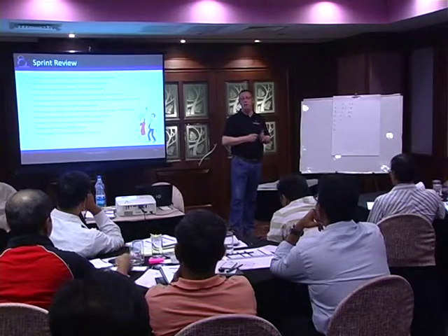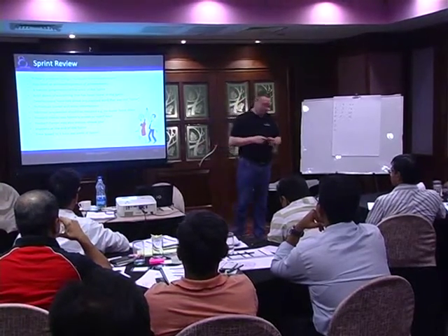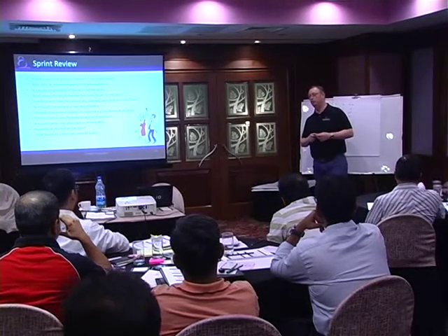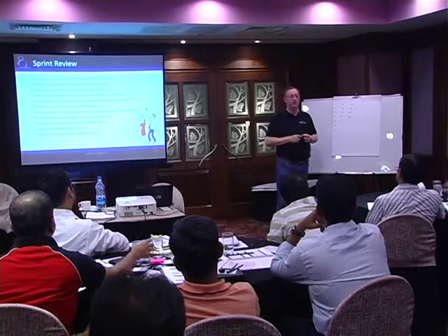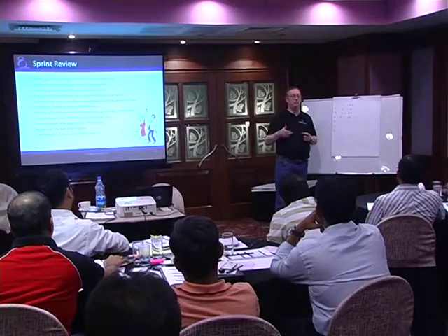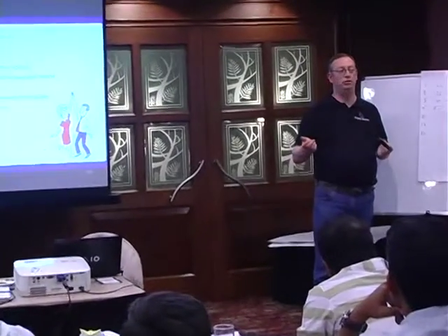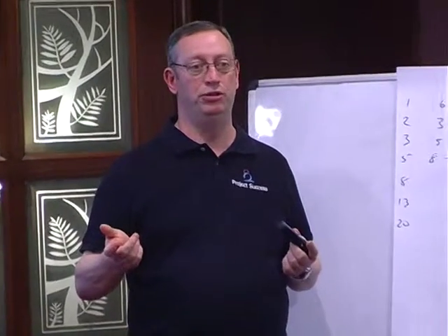1 hour per week of sprint is the time box for us. Now, I view that time box not as a hard and fast rule of Scrum. I view that time box as a guideline. Because if you're getting valuable feedback, and that's the purpose of the meeting, why would you stop it because the time was gone? It should never overrun by much, a few minutes, 5 to 10 minutes at most. But if you're getting valuable feedback, that's what you're there for.